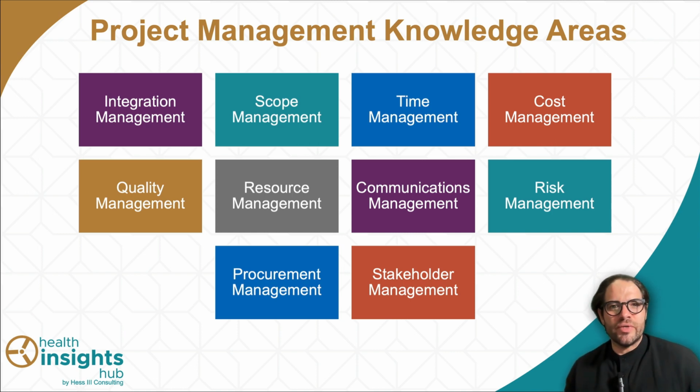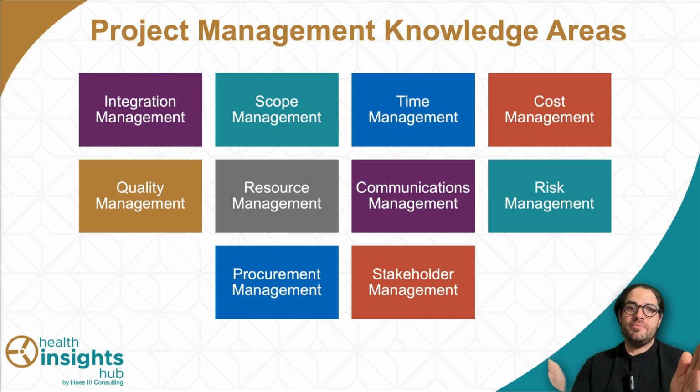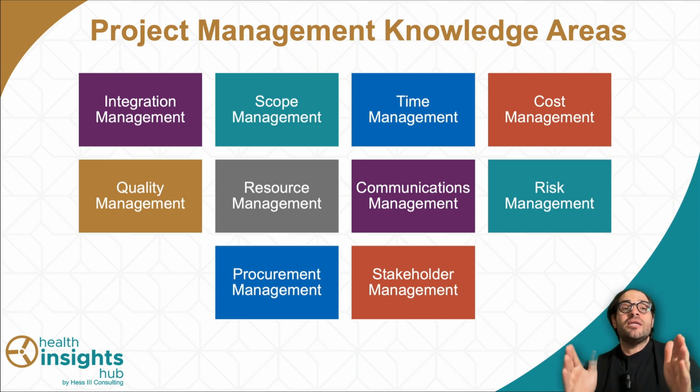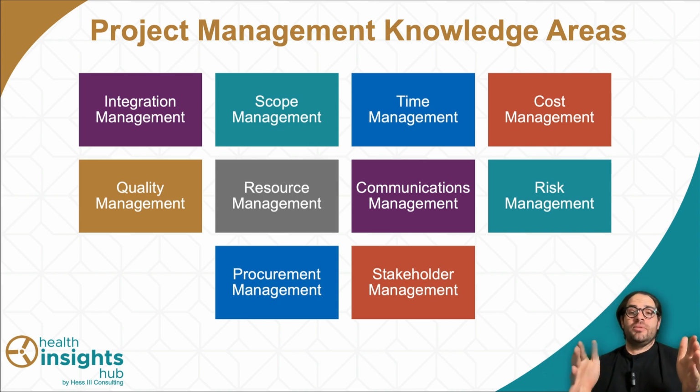We don't always have all the resources that we need. So if, for whatever reason, to complete your project you need to purchase a mobile health clinic. Actually, I just did this with a client, and that was what they wanted to do. They wanted to purchase a mobile health clinic, but the mobile health clinic had a 5-month lead time. So you order it and it takes 5 months for that thing to be delivered. That really impacted our project timeline and our schedule.